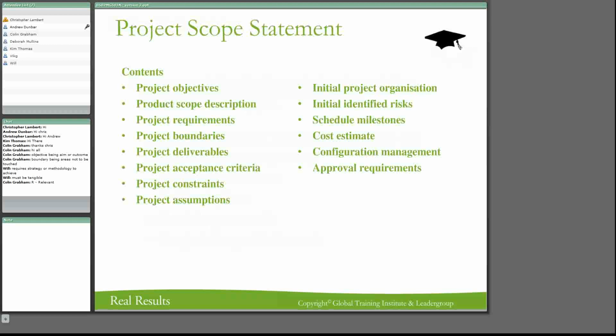The acceptance criteria. Oh, that is so important in project scoping. What is the criteria for acceptance? How good must it be? What are the things that the client must say? If these things are there, and if these things are signed off, this is your project deliverable. It's done, and you can say it. If you do that up front, then the arguments are relieved later on, when nobody can remember what the criteria would be for a particular deliverable.